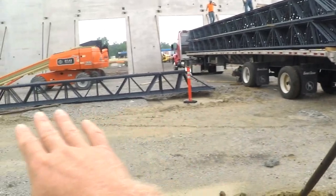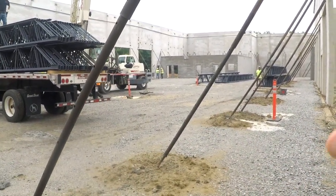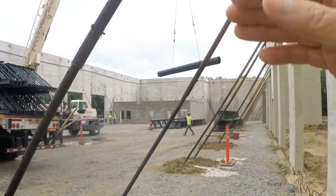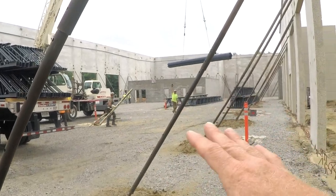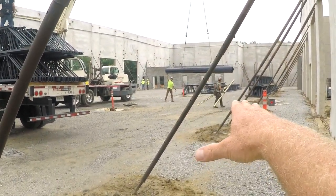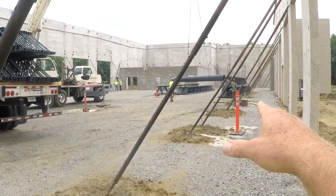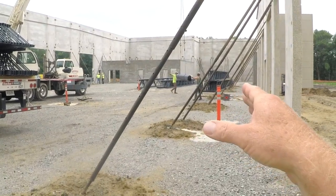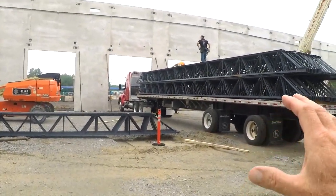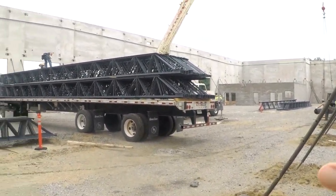Now, if you notice in this area, I've got a half a dozen iron workers. There are no other trades. This is their zone. Subpart R of steel erection states no other trades can be working in the vicinity of these swinging loads, and that these iron workers jurisdictionally have the right to be the only ones here during this very, very dangerous application.